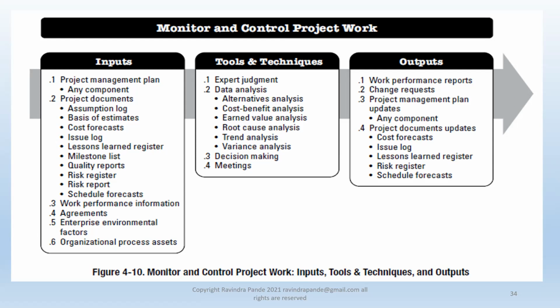Or you try to understand, am I on the plan? Then it should be 1. So if 4 hours are to be spent on the installation of that biometric machine and you spend 4 hours, it's good. If you spend 4.5 hours, well, you are doing badly. If you complete it in 3.5 hours, you are better.